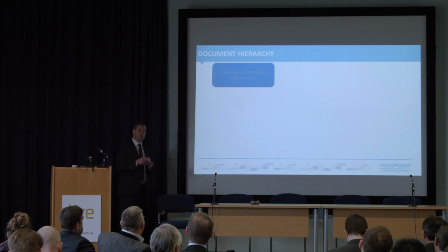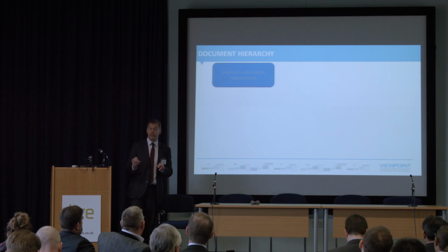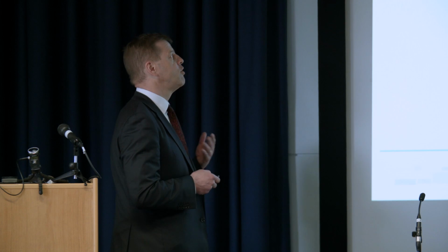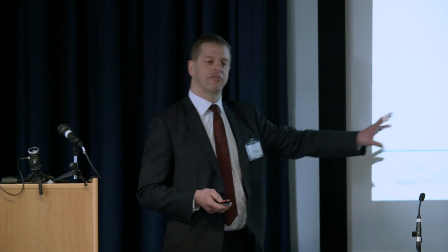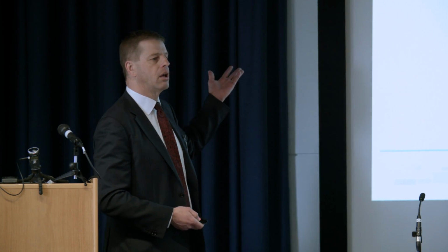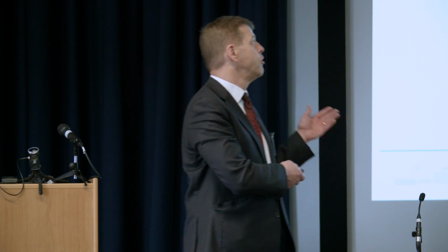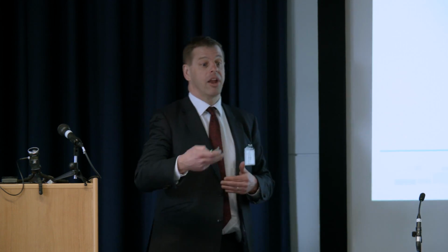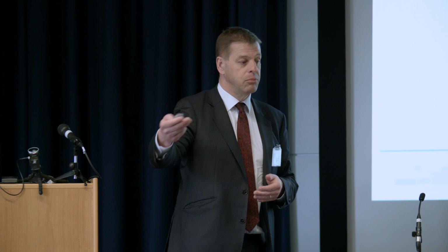So that's one of the things that we would expect a good CDE to be able to do. We also have a procurement process set out in PAS 1192, part 2. So that talks about the fact that after we've got our organisational requirements, our asset requirements, once we had a job, the employer puts together, as part of the old traditional procurement route, sets of employers' requirements, but now to define the soft deliverable, we have EIRs to define what's required in terms of the documents, data, and models.